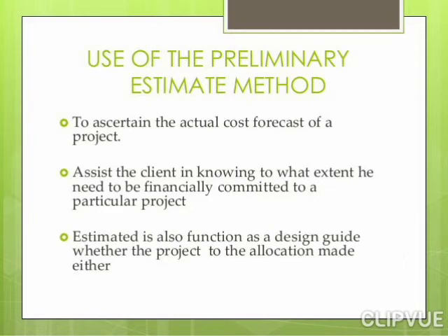The preliminary estimate method is used to ascertain the actual cost forecast of a project, to assist the client in knowing to what extent he needs to be financially committed to a particular project. The estimate also functions as a design guide as to whether the project fits the allocation made.